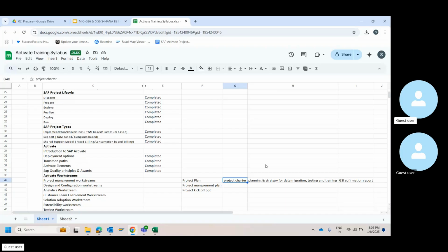Apart from that, you will also have progress metrics to monitor the activities that we have as part of each phase, then assumptions and exclusions, followed by items for the project risk and the project communication. All of this will fall under the project charter.